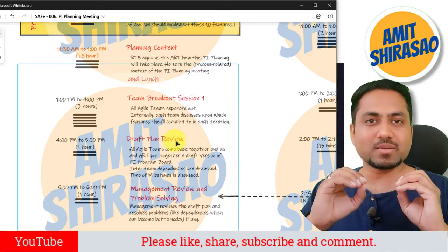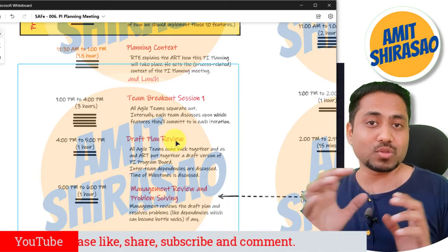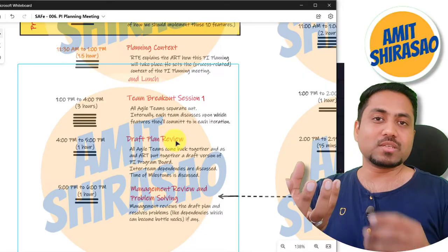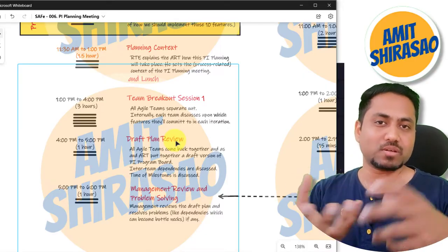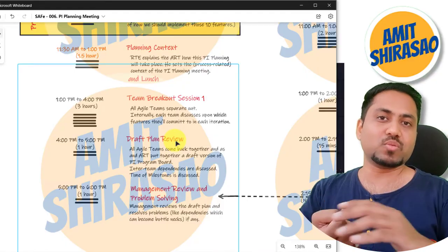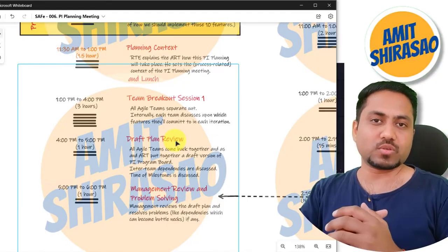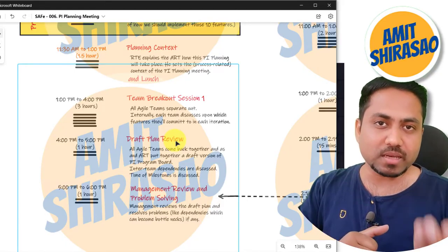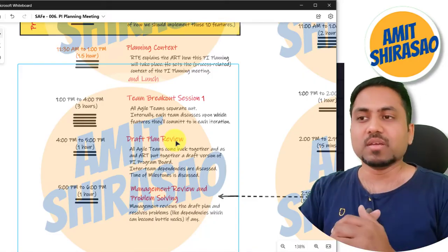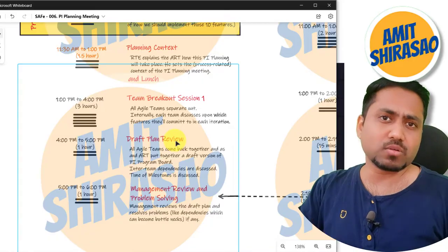Of course, if you ask by the book, is it good to loan out resources? No, it is not good, because then your team is not consistent. All your team metrics will look fluctuating all the time, so you cannot guess how the team is doing over time. Of course, you should not loan out resources, but loaning out resources is a reality. You do it. Probably many people do it all the time. Should it be done as per the book? No, it should not be done.